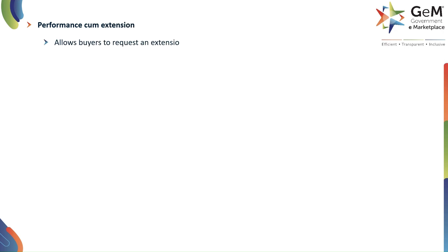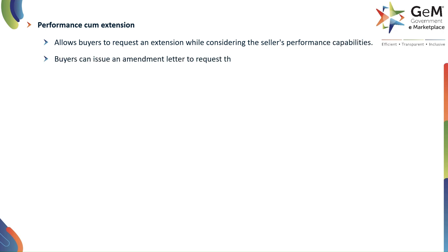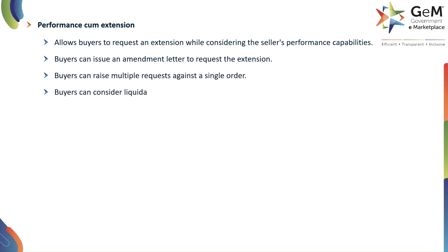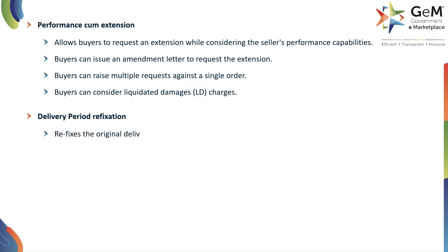Here are some important guidelines. First, performance cum extension allows buyers to request an extension while considering the seller's performance capabilities. Buyers can issue an amendment letter to request the extension. Buyers can raise multiple requests against a single order. Buyers can also consider liquidated damages (LD charges) liability for delivery period refixation.